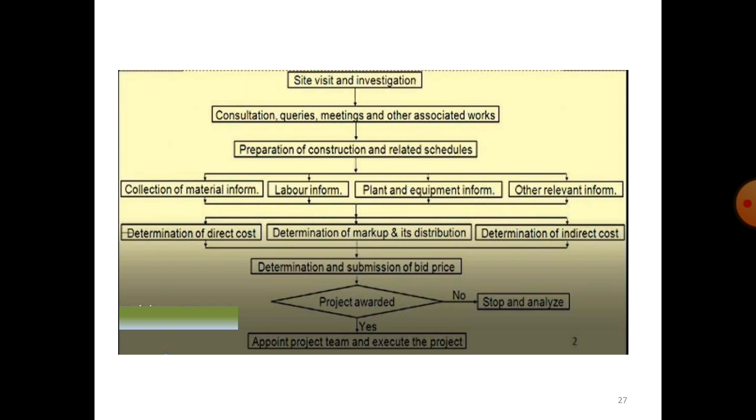Then, if your tender is selected, a site visit and investigation is done, and after the site visit and investigation, the next step is consultation, queries, meetings and other associated work. Next is to prepare the construction and related schedule. Here the construction and related schedule has four parts.